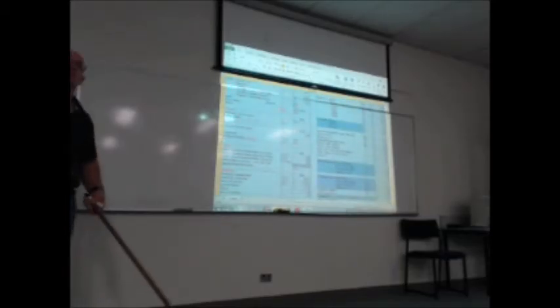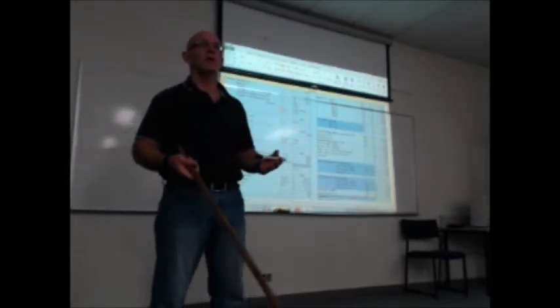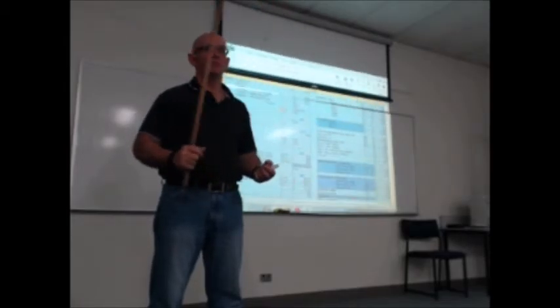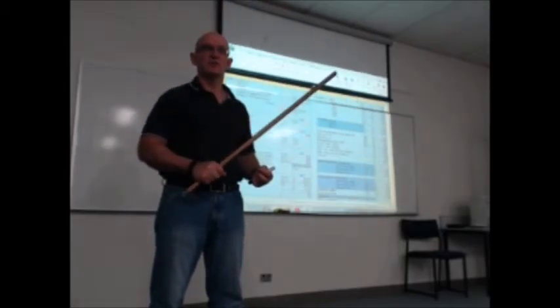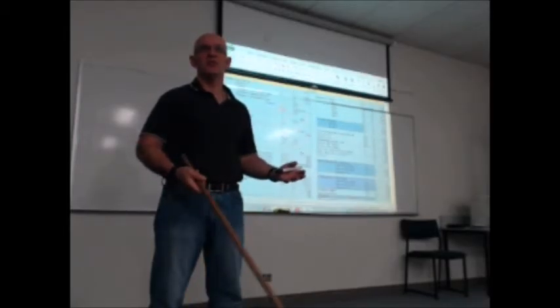What number? It's 56. Use that price. Windows, you're going to put out for a quote, because unless you're doing volume work, there's never two houses the same for windows. Once you do get that, then you've got a square metre price you can work on.